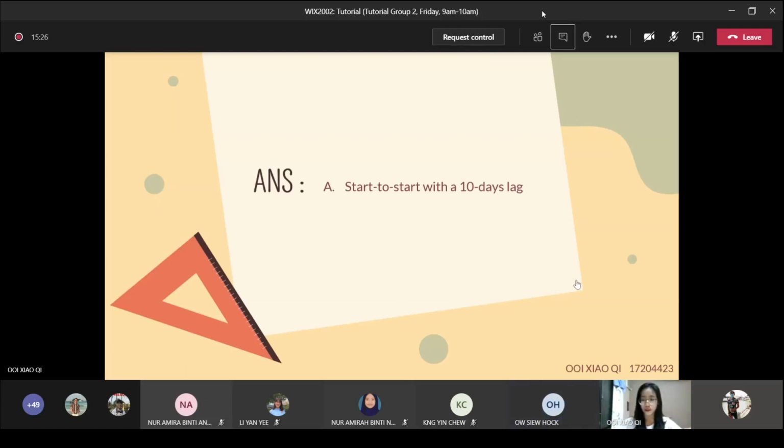Yes, good. Yeah, you have to take note, the clue, if you look at the keyword, begin, so it's start to start. So when it says complete, that means it will be finish to finish. You understand? Good. That's good. Very good explanation. Okay, thank you. Okay, next.